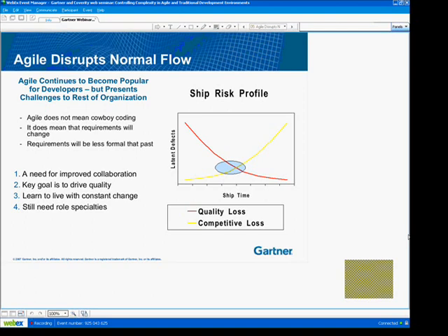Well, that works great, but as I scale out and have a larger project, and I may start to have a number of those small teams that work together, there's a good probability they have shared work, or that one team is building something another team relies on. In order to capture and share that information, it's got to be documented and put down somewhere. So a testing organization still is going to become a specialization in any organization of size and for any project that is complex at all.